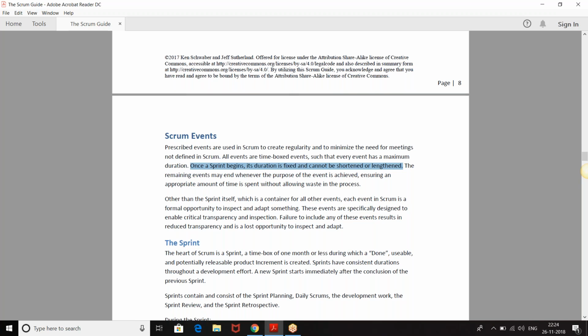If you have not finished the work, then you will again take it to the next sprint, but it will not wait for you to finish. You'll place it back into the product backlog. As a team, you will discuss why you were not able to finish this work.